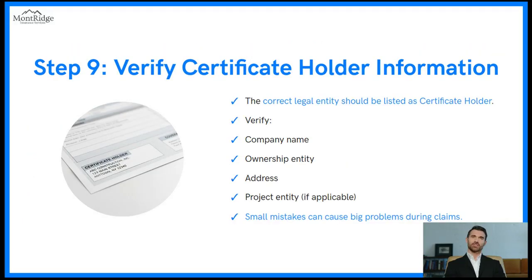Step 9. Verify certificate holder information. The correct legal entity should be listed as certificate holder. Verify company name, ownership entity, address, project entity if applicable. Small mistakes can cause big problems during claims.